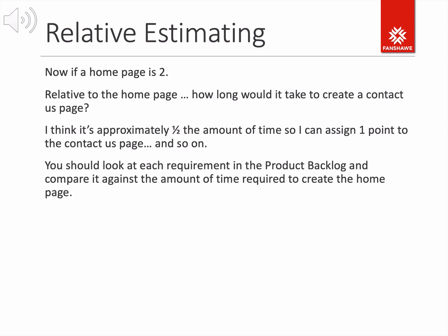So now that we've established that a home page takes 8 hours to complete, I need to assign a number to it, and that's 2. Remembering that we don't put our estimates down in terms of number of hours, we put it down in terms of relative size. So let's say that the home page is a 2. Perfect. Well, relative to the home page then, how long would it take us to create a contact page?